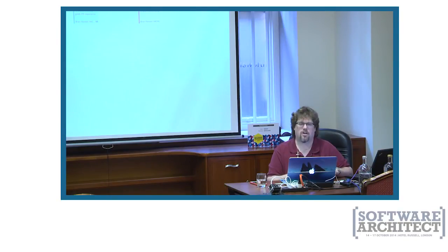And these numbers here tell you how many you have in that particular state, and you can move it from state to state by dragging and dropping. The smaller number is telling you your maximum number you want to have at any one time. So it's a high-level project management feature. When I drill down to the sprint, though, I can see a task board and see a more developer-centric approach. So I can see I have work that's to do, in progress, and then done.